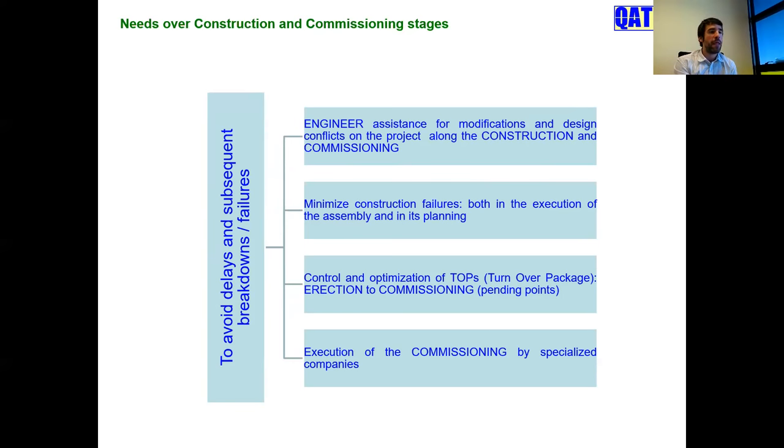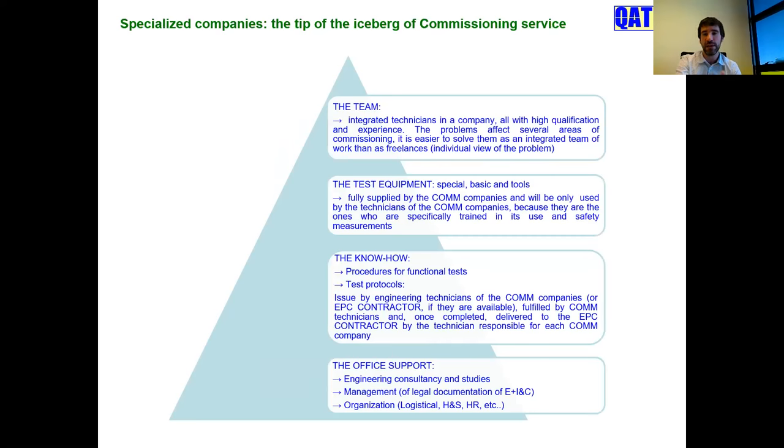Okay, but it's very important to analyze the turnover packages, because it's the start of the commissioning. And of course, the execution of the commissioning by specialized companies, not freelance. What does a commissioning by specialized companies mean? When you see the commissioning team in the field, in the plant, you have maybe six electricians, six or seven instrumentation technicians, mechanical, but there is not only the people. There is a background in a remote office that is very necessary.